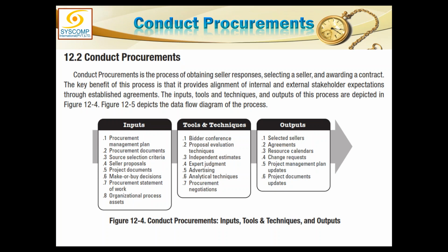Before the bids arrive, we conduct a bidder meeting or bidder conference in which the bidders come and their doubts, questions and queries are clarified. Then on the last day of submission of bids, all the bids or proposals are received.